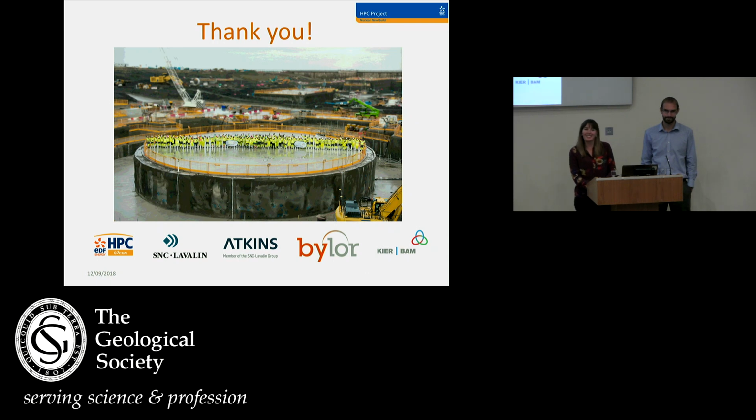Some of them, you'd be surprised, even the formations themselves are only allowed to be open 48 hours because of the rate of disintegration on the surface that we experience anyway. But also, the concrete's specifically designed to meet the interaction with pyrite. So there are additional protective measures employed in the design, whether it be sacrificial blinding concrete or membranes, to accommodate and account for the potential aggressivity towards the concrete.